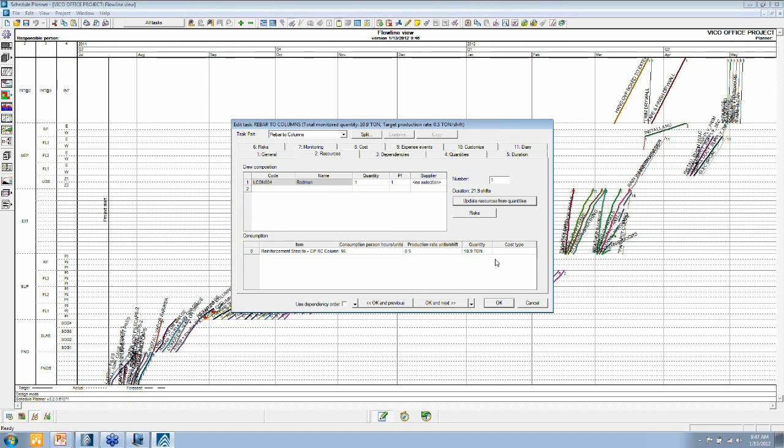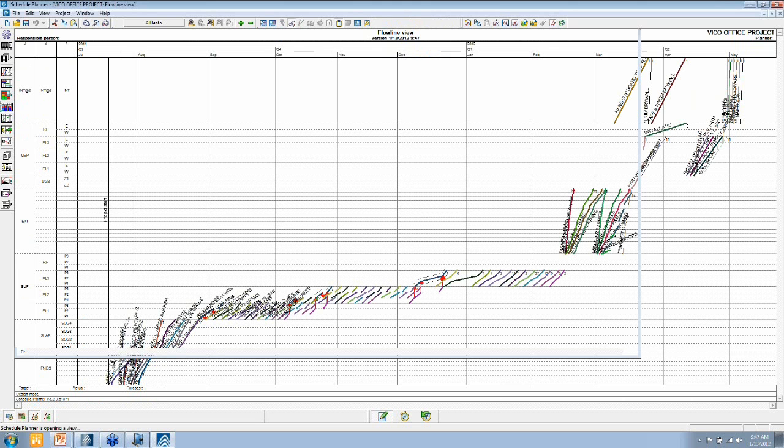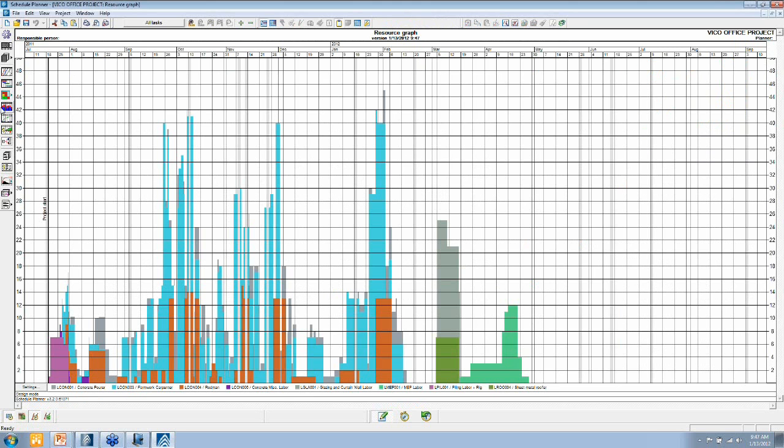That tells us just by reading the information from the link to cost plan when I need the resources over time. So that's the resource graph that I can just read from the project information. I don't need to do any resource loading. All of that is coming from the integrated data set.